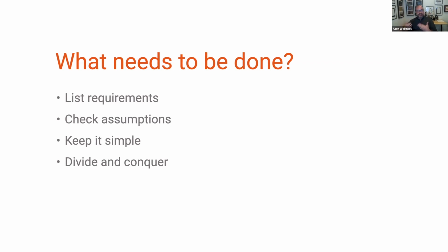That is a great way of making sure that you're defending your project and also just keeping it as condensed as possible. And the reason why this is important is that, going back to those numbers earlier about website failure, the bigger the project gets, the riskier it gets, right? When you're talking about digital projects, they're not all made the same. A digital transformation project, something that's completely overhauling the systems within an organization, has a failure rate of about 70%. But if you go down to the microsite level, a really tiny project, the failure rate goes below 10%. So by keeping it as simple as possible, you are removing risk from your project.